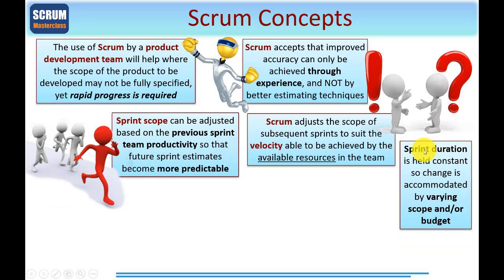Sprints, also known generally as time boxes, have a constant duration, so that any change needed during them is accommodated by varying scope and or the budget. If you've come from a traditional project management environment, you'll know about the six performance criteria — time, cost, scope, benefits and risk. With a traditional project, scope will be held constant and you would vary time and cost. Here it's the reverse, where time is held constant, and you can only adjust the other performance variables from the point in time when the Sprint starts to when it finishes.